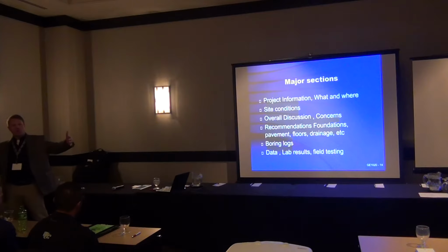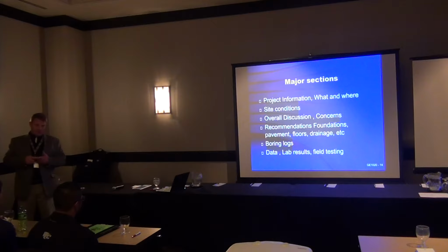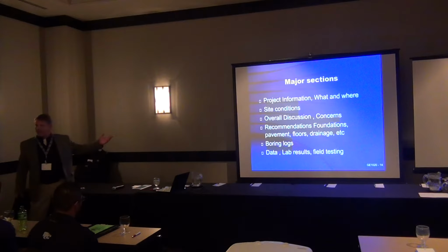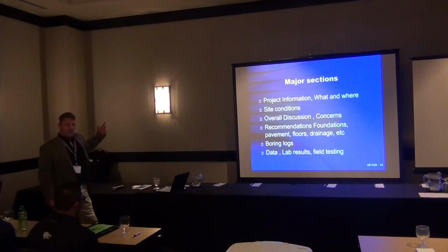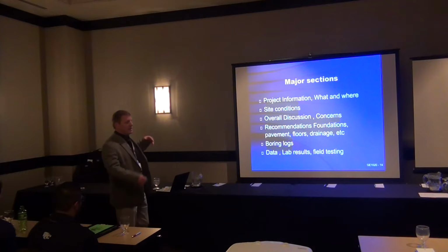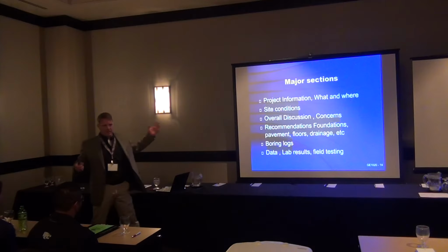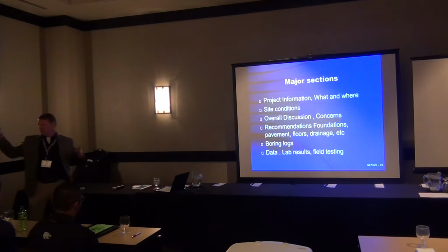It's difficult to do that in less than a month. 3 weeks is a real stretch. You've got utilities that have to get called in before you can drill it. You've got a couple of days in the field to do field work. The lab testing takes a week. You've got to analyze it. You've got another week to get a report done, get some review done on it, get comments back from the design team. So it's a month from start to finish, roughly.